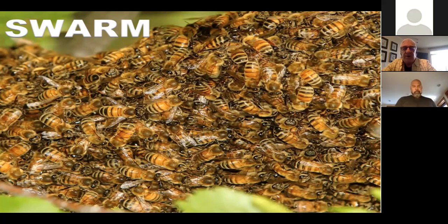So we will choose 2 or 3 or 4, however many people, to work on a story and get it done in half a day, rather than one person taking 2 days to work on the story. There are a lot of fairly good and obvious benefits to doing that. Lots of synergy, lots of knowledge sharing, lots of multiple eyes on the code. So it is the style in which good Scrum teams work.